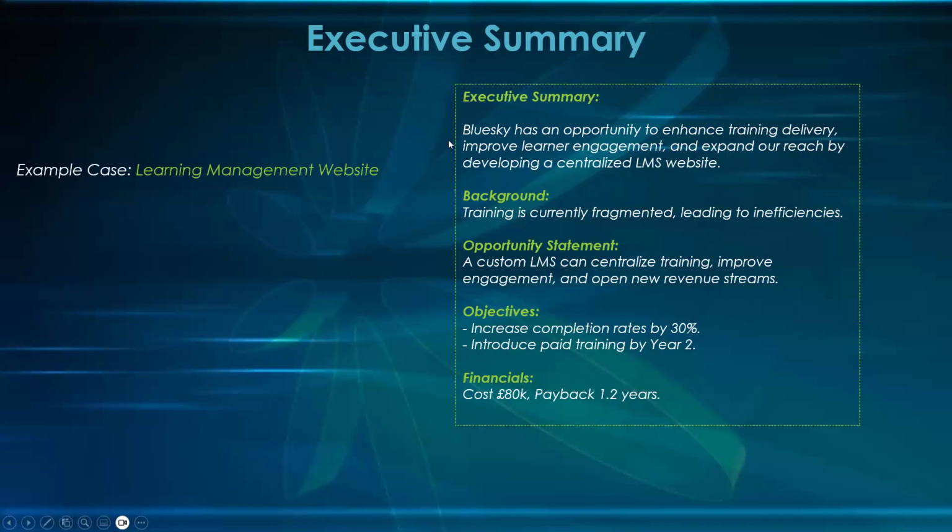Okay. So executive summary. We take up everything from the beginning down to the costs, and you see the payback period. You just give them a breakdown of everything. Remember, the executive summary is what you write last. But when you're doing the presentation, it comes to the top of the document. It becomes the first page after your contents. What's that thing called?